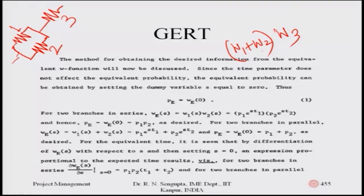Continuing the discussion: for two branches in parallel, the equivalent W function is the sum of them. When the dummy variable W is set to zero, e to the power of any value multiplied by the S value of zero becomes one, since e to the power zero is one. Based on that, the W function gives P1 and P2. For series, it is multiplication; for parallel, it is summation.